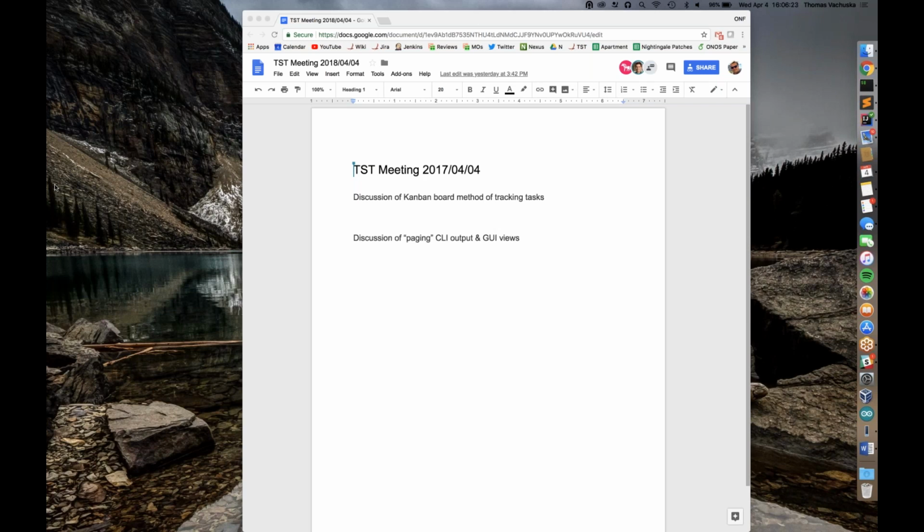What we're doing today is we have a bookend release planning and release review meetings at the start and end of each release, where we decide on major features and major objectives or theme for the release, and then we sort of leave it in the middle. We leave it up to individual teams to run how they want to run. Generally, we were planning kind of synchronized sprints, where we invited the leaders of various brigades and teams to plan the sprint along with everybody else.